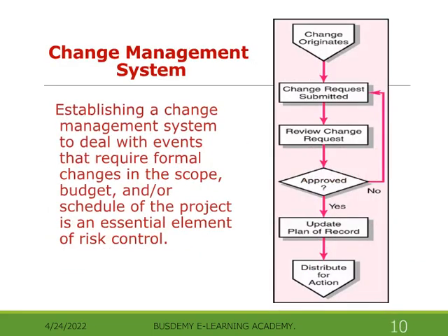The importance of change management system. Establishing a change management system to deal with events that require formal changes in the scope, budget, and/or schedule of the project is an essential element of risk control.